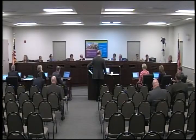Dr. Phillips? Yeah. One thing that we haven't talked about yet was this one sentence that says final completion will be approximately 15 months after a notice to proceed is issued to the contractor. So November's the earliest, so it's December, January, February. So February 2016 is now the earliest. So we're talking about opening up the school. We're not going to be using that school in the 2015-2016 timeframe.